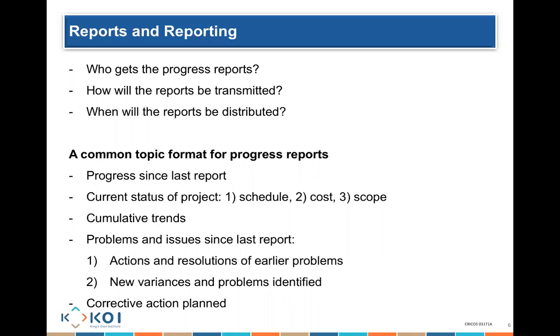I need to look at the cumulative trend. For example, I might have been over budget in week 1, but then under budget in week 2. And because I was under budget now, you're going to have a balance in terms of the costing. So you're not going to really be over budget now because of these cumulative trends, up, down, whatever's happening.